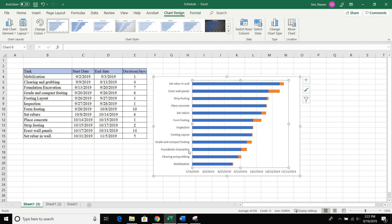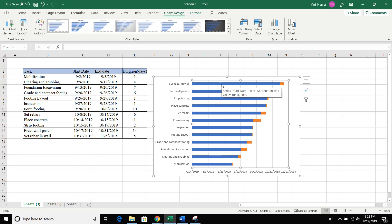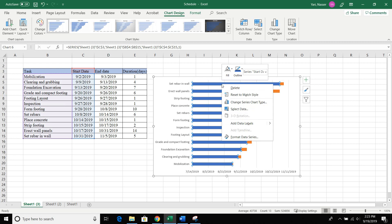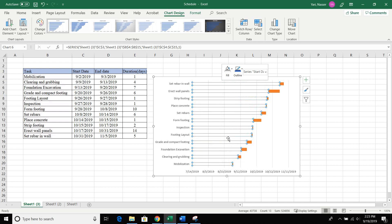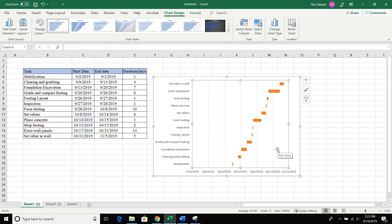Now looking at our graph, there are a few things to clean up. First, we want to get rid of the blue bar because our activity is shown in orange. Also, the activity tasks are in reverse order — mobilization is at the bottom but should be at the top. Let's click on the blue bar; you'll see the column highlighted. Right-click it, find Fill in the menu, open the drop-down, select No Fill, and now it's gone.